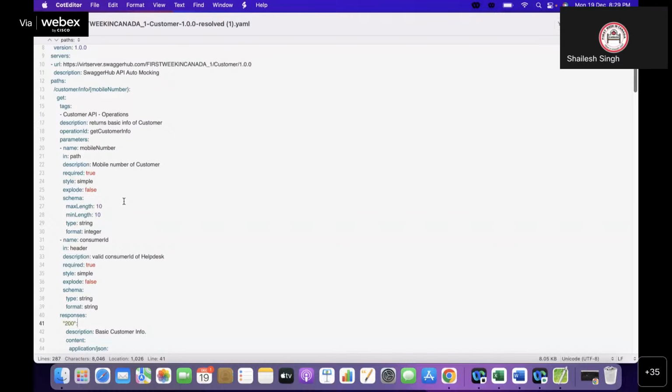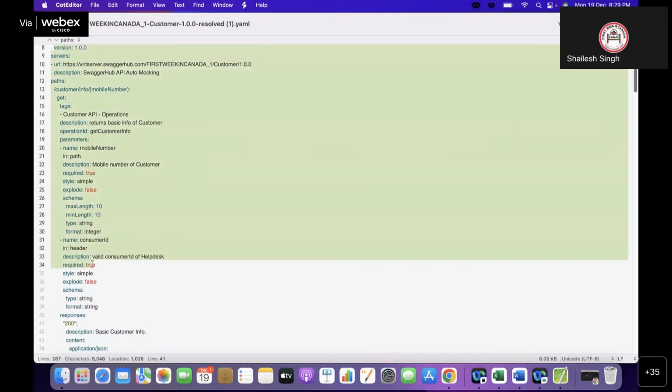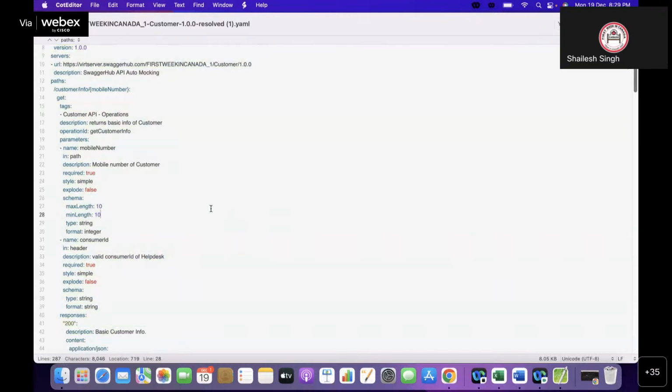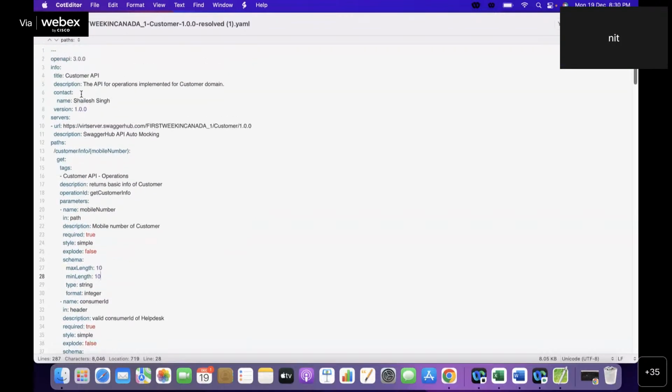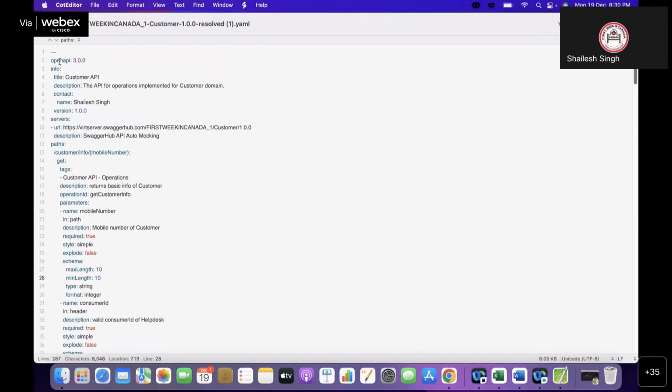When the product owner takes this requirement, the epic, before that itself, these things need to be defined. Otherwise, in the first sprint you will be designing only this, and in sprint 2 you will be developing. Maybe it is possible that your team has to design this. But both things cannot happen parallelly, because testers and developers need something based on which they will do the development. Developers should know what the input parameter fields will be and what fields I'm going to receive in the response.